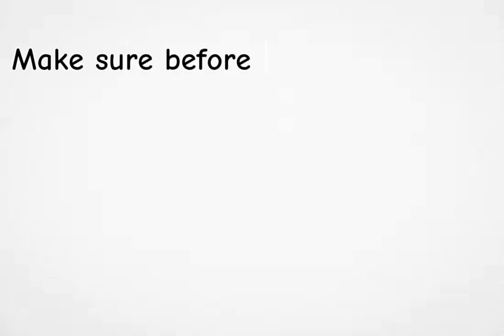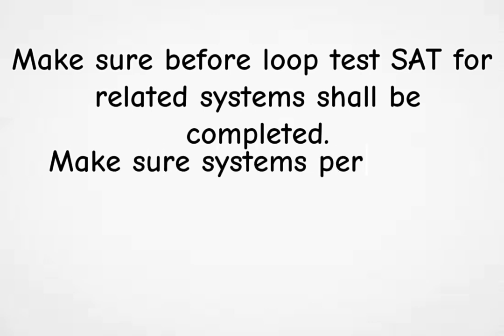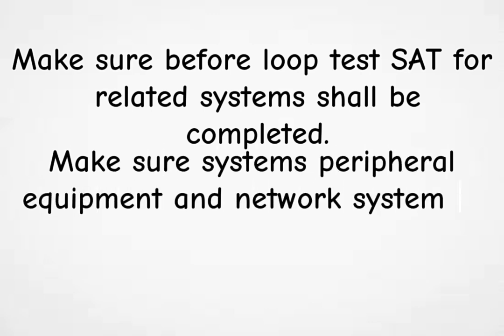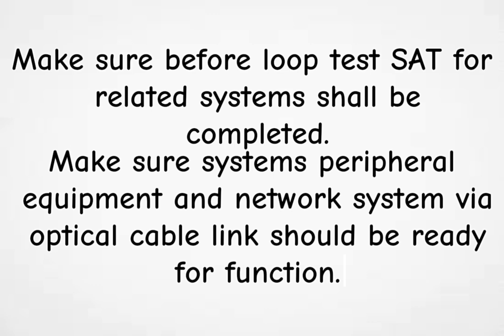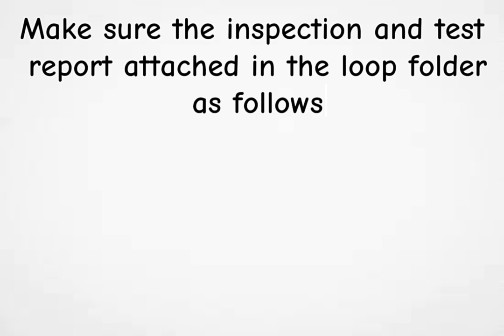First of all, make sure before loop test, related systems shall be completed. Make sure systems peripheral equipment and network system via optical cable link should be ready for function. Make sure the inspection and test report is attached in the loop folder as follows.